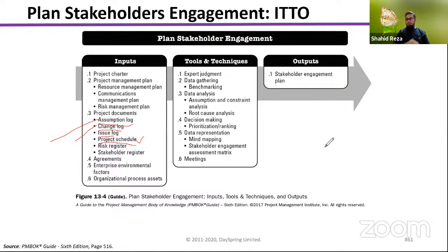So this project schedule will help you to understand what kind of stakeholders are actually going to be involved in which phases or time of the project. So accordingly, you have to make a plan for engaging them.